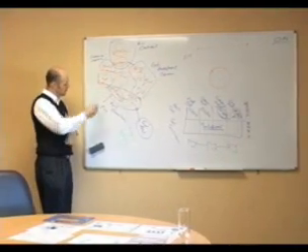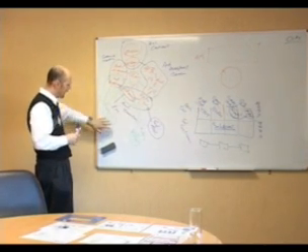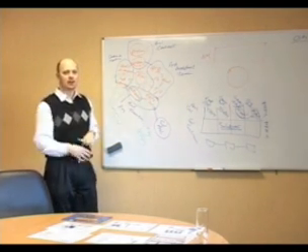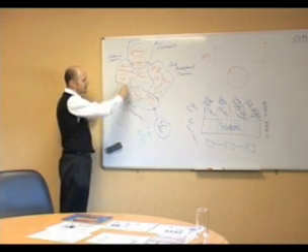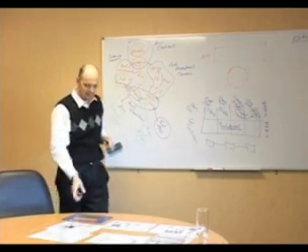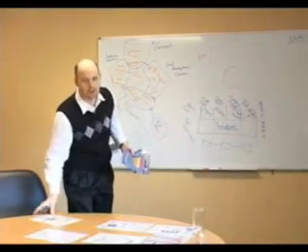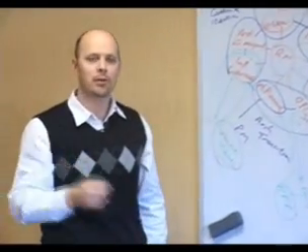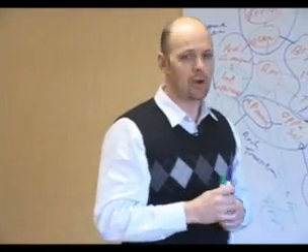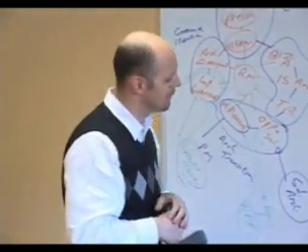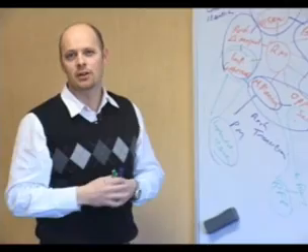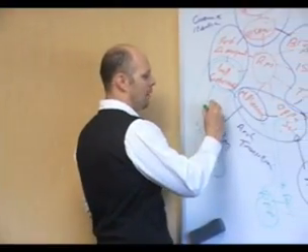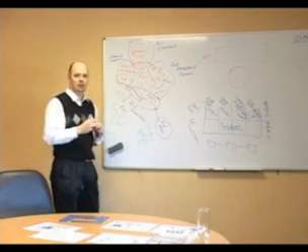All right, so we've gone through some of those iterations. This is the implementation iteration. And this is effectively where the project now gets built by the vendor, by an outsourcer, by my internal development team. All of that occurs here, of which the architects govern that exercise. And they're constantly looking in and they're saying, I gave you this, and what did you deliver for me, and what is the gap? And that is the governance exercise, where they're effectively using checklists for fairly small projects or larger tools like the ATAM, which is the Carnegie Mellon Software Engineering Institute, one of their tools to measure compliance of your architecture to your business drivers. So it's a good tool which you can use to effectively measure how well my implementation is occurring in line with the architectural landscape that I built.